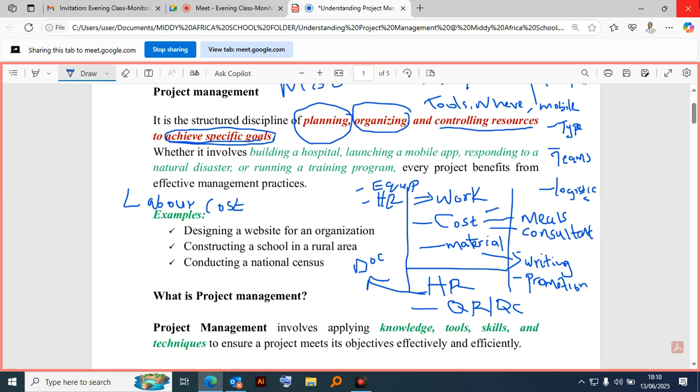For example, you have the vehicles. You have what you call the devices. Let's say you are collecting data using mobiles. You need to have a clear record of the number of phones that have left the office. You need to assign somebody who can identify, or keep records on, the items that have been released to the field.